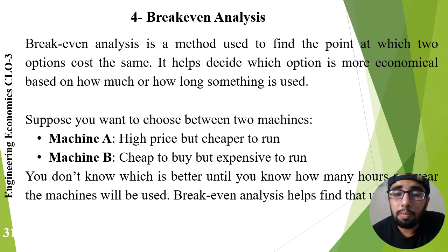Break-even analysis. Break-even analysis helps determine the point at which two alternatives have equal costs. This technique is particularly useful when comparing equipment with different purchase and operating costs. For example, one machine has a higher purchase price but low operating cost, and the second machine has a low purchase price but higher operating cost. Break-even analysis identifies the usage level at which one alternative becomes more economical than the other. This helps managers make informed investment decisions.